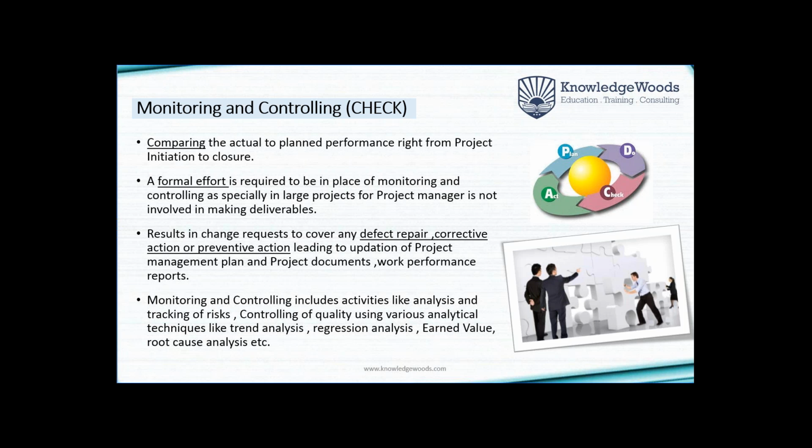You may have to change the vendor in between. So changing the vendor, acquiring the people, getting the backup, etc., does not happen immediately, right? The people are not available, the vendors are not available off the shelf, right? It may involve cost. It may involve timelines also, right? So all these things are related, integrated with each other. The effect of one monitoring and controlling activity will have an impact on the other activities also. So the baselines need to be revised.